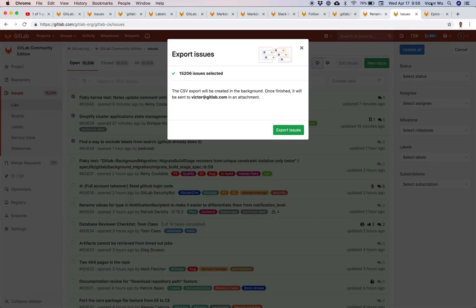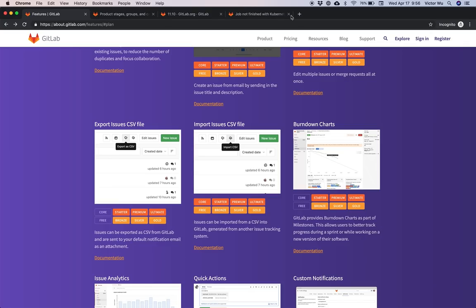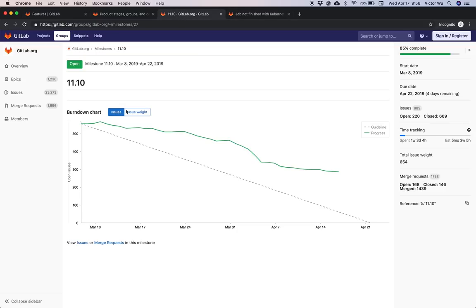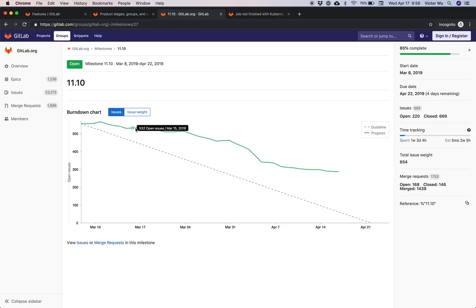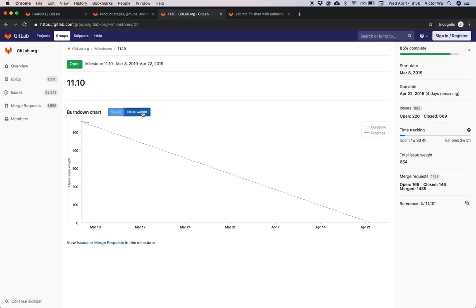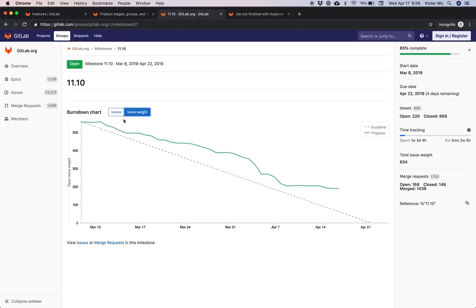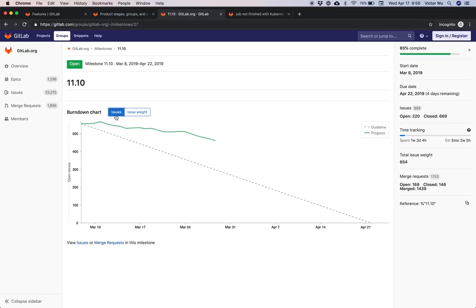Burn down charts are a really awesome feature, currently associated with the milestone itself. Here is a milestone and its burndown chart showing issues burned down. You can view it by weight as well as by issue count.